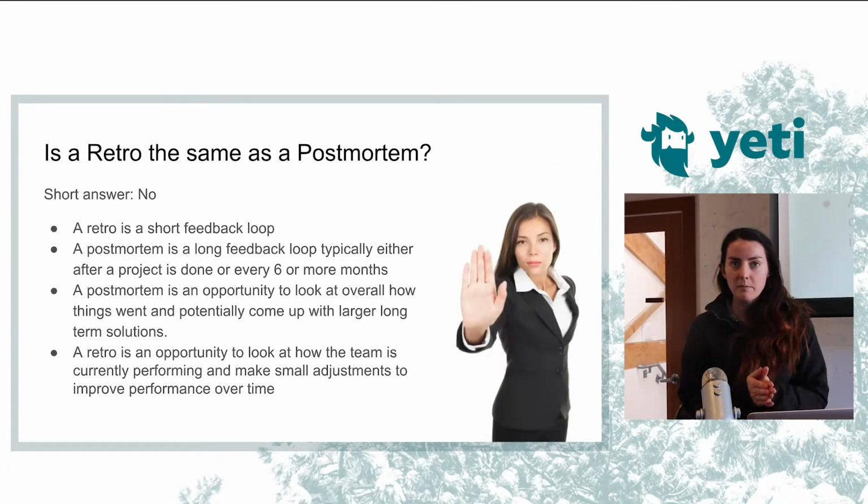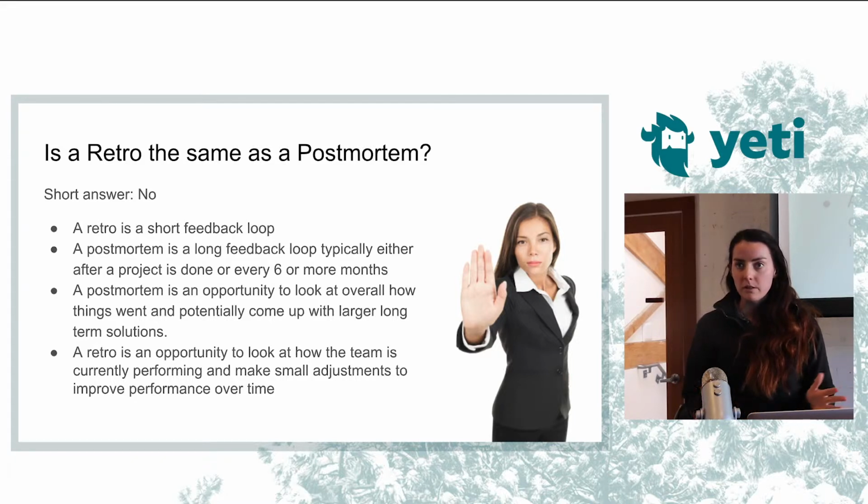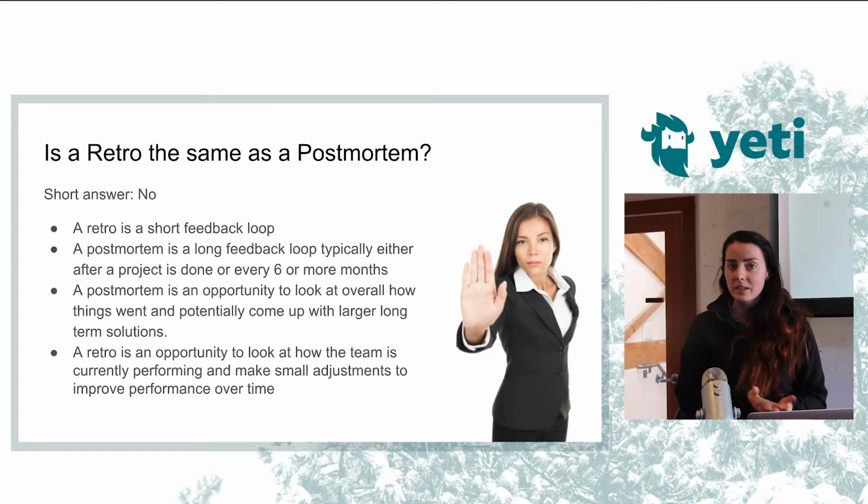A lot of the time, retrospective and postmortem are used interchangeably. And for a long time, I thought that they were just two words for the same thing. They're not at all, actually. A postmortem is a much longer feedback loop. You would do a postmortem maybe every 6 months to even once a year, or just after the end of a project. They are usually much longer meetings.